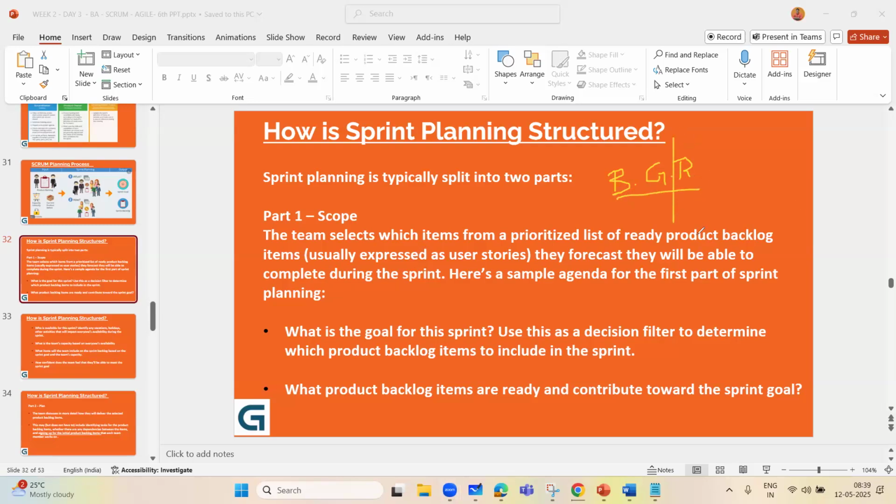So in the backlog refinement meeting, what you will do is make items ready. How will you make them ready? You will understand what exactly you are going to deliver. Any question, you will go back to the business analyst, because business analysts are generally the SMEs who understand requirements in more detail and are in touch with the customer deeply to clarify the requirement, understand it and translate it to the other staff members. With me so far, everyone? Geeta, Aparna, Kajal, and Jibran? Yes, sir. Superb.